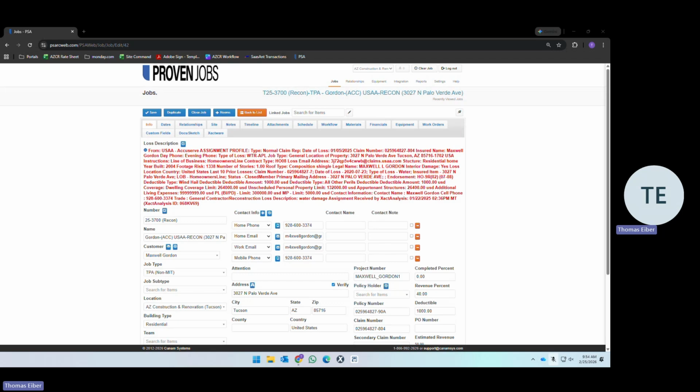Lastly, key transition points. At authorization to proceed, you receive the job, you assign the PM, schedule, put a pre-con walk in. Ongoing, you are going to provide regular production updates. And the last key transition point is at job completion, you issue PCN and it goes to AR and the job is out of production, no longer your responsibility unless there are additional details needed by AR.